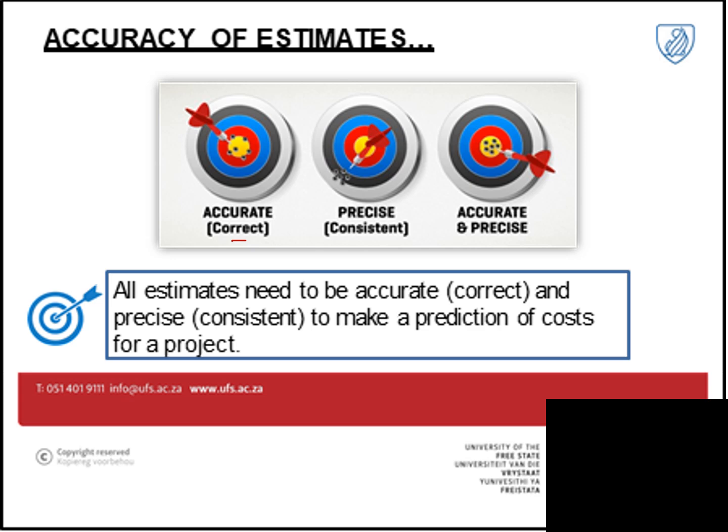For instance, if you're working with an office building and no one really thinks about the ICT or the access control installation or so, you should be in a position to think about those items that haven't been thought of by all of the design team at that stage, because you will have to incorporate that later in your design. Unfortunately, the only real thing that assists with this is experience and working with someone that has worked on similar projects before, who can identify the possible risks of items being omitted at that stage.